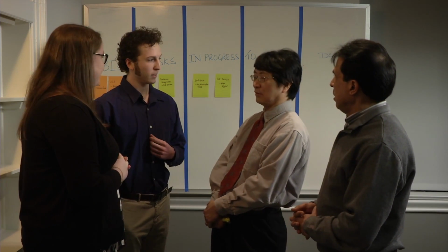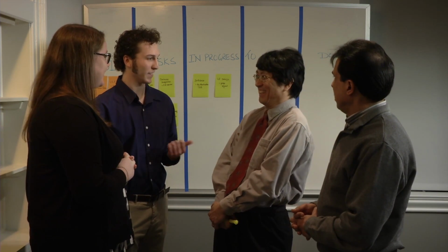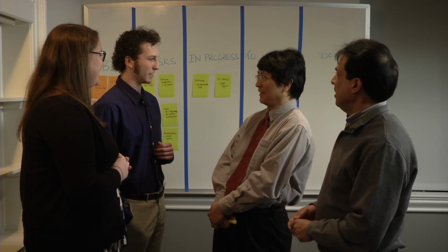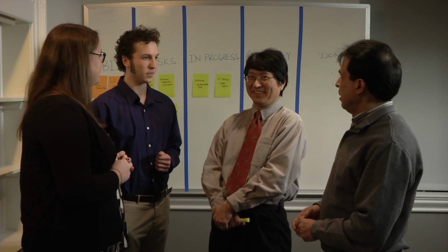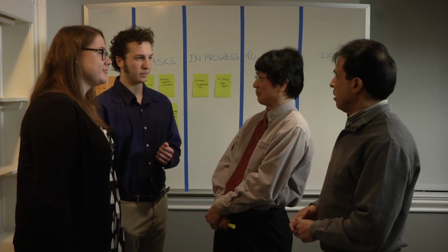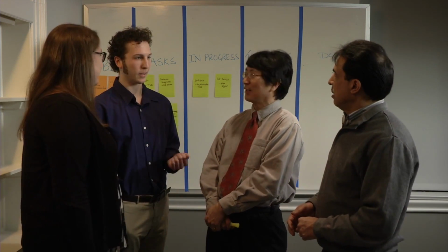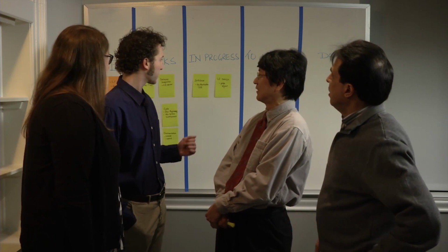It is expected that every team member be punctual in attending this meeting. The product owner, however, may or may not participate. During this sprint, items for discussion may arise. Such items should be listed in a sidebar and be addressed after the Scrum meeting.